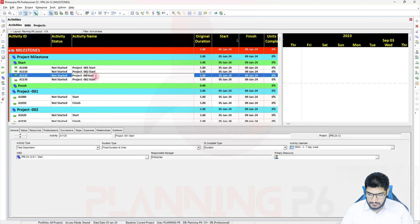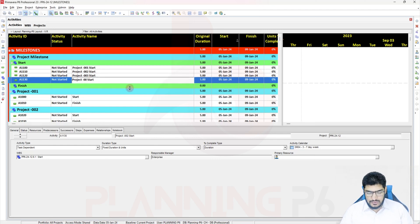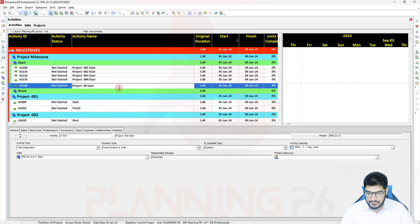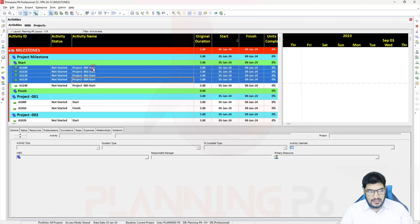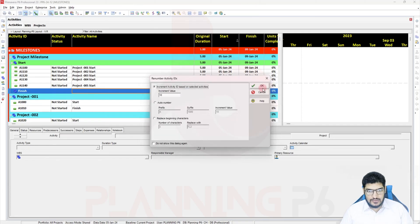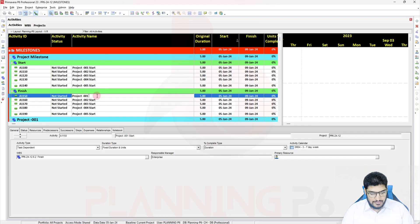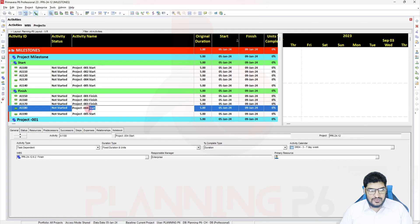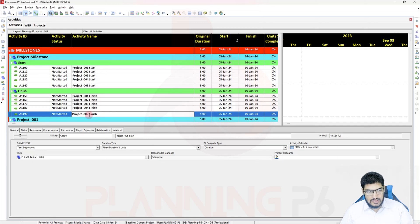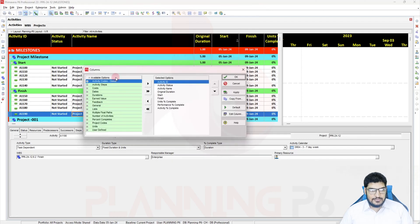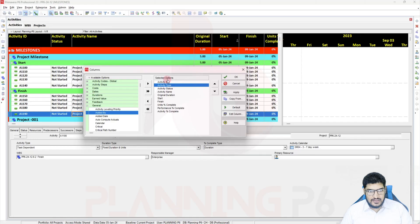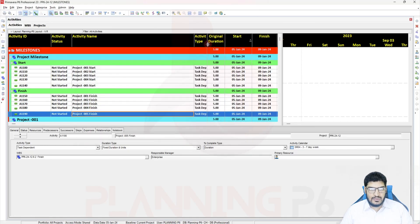I will name the activities: Project 001, Project 002, Project 003, Project 004, and Project 005 for the start milestones, then copy all activities and place them under the Finish milestone WBS. Now I will add the Activity Type column so we can change the types accordingly.